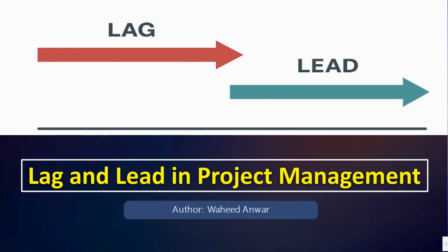Sometimes you need a waiting period or waiting time before the next task can start. Other times, you may want to overlap activities to save time, and that is exactly where we use two powerful tools in scheduling: lag and lead.